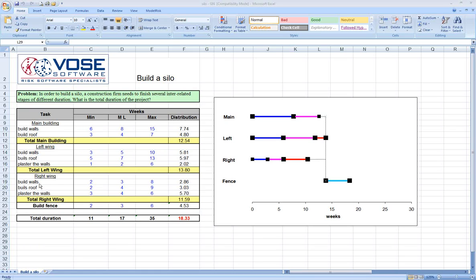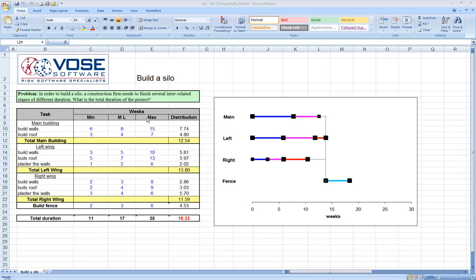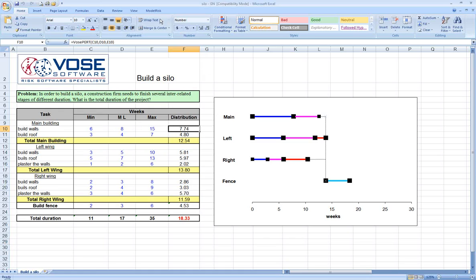There are a number of ways to represent expert opinion and distributions. I would refer you to the ModelRisk help file for details about those options. One of the most popular ways to represent uncertainty around schedule duration or project cost is with a distribution called the PERT distribution. The reason is that experts often give estimates in the form of a minimum, a most likely, and a maximum.